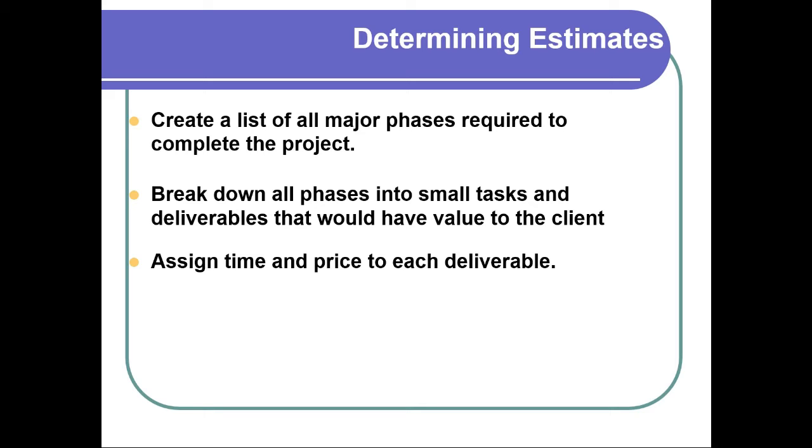But many companies just use what they call a blended rate. So they just average together. Okay, so I've got a senior instructional designer. I have a junior instructional designer. One's $100 an hour, one's $50, so the average is $75 an hour. So our blended rate is $75 an hour.